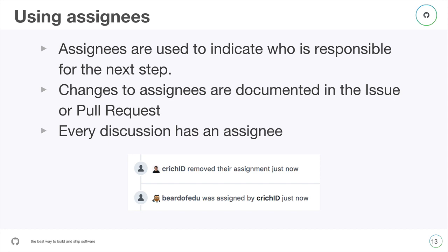We will go through every now and then and look at our list of all of the issues in our repository, quickly go down through the list and look for ones that don't have anybody assigned, and make sure that someone's assigned, or we close out those issues.